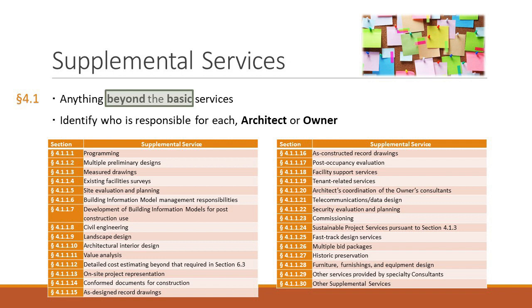It helps you discuss more business things, and those are called supplemental services. Additional services are, I'm supposed to do structural work, but now you want me to do more structural work that wasn't anticipated in my original fee. So additional services are the basics, but you're doing more than what was anticipated in the basics of those three, including four: architectural, structural, mechanical, and electrical. So that's the difference.